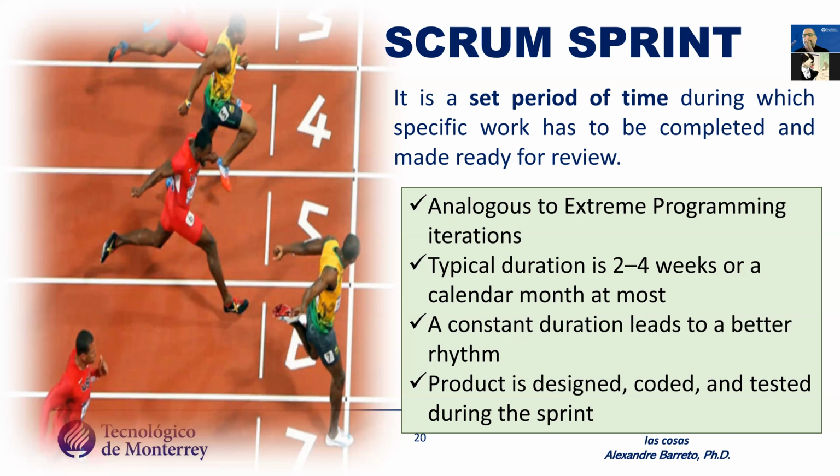You don't change because you use the amount of work that you develop during the sprint to calibrate the story points and to calibrate the individual performance of each member in the project. If you change, for example, one sprint to 1 week and other sprints to 2 weeks, you cannot measure the performance of the team, you cannot measure the performance of the sprint.